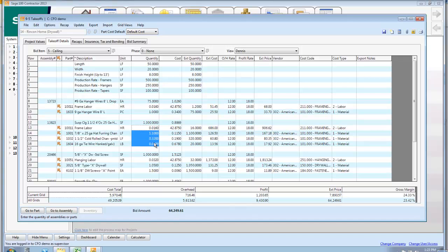So these are the components that make up an individual assembly. Odd numbers, but they work. And then it just takes this 1,000 and multiplies these finished quantities out. So I need 16 hours of labor, 1,100 of the channel, and 320 feet of this channel here based on these calculations.